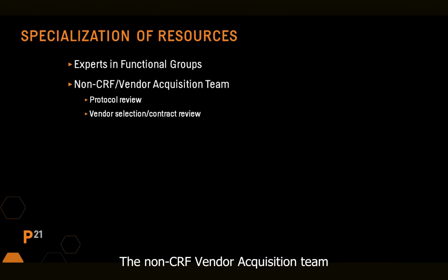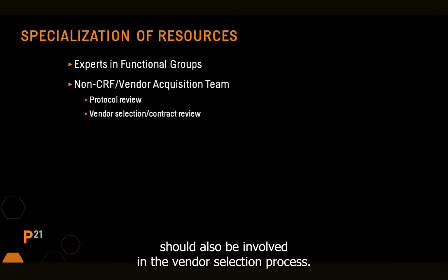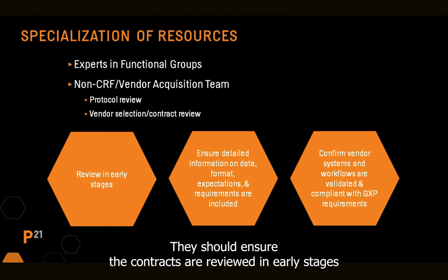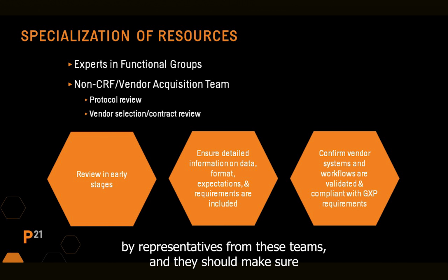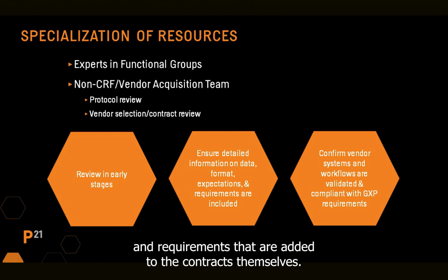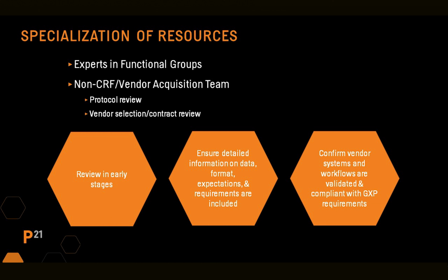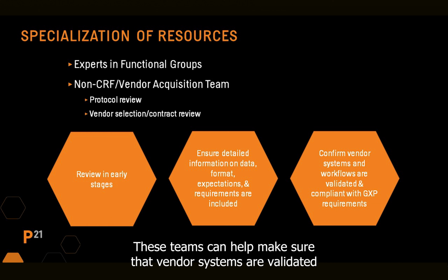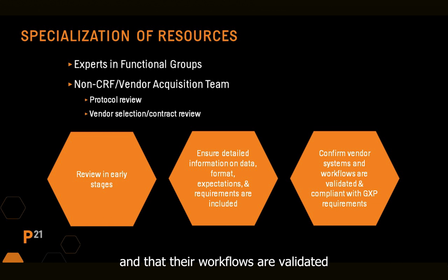The non-CRF vendor acquisition team should also be involved in the vendor selection process. They should ensure that contracts are reviewed in early stages by representatives from these teams, and they should make sure that more detailed information about data format expectations and requirements is added to the contracts themselves. These teams can help make sure that vendor systems are validated and that their workflows are validated and comply with all GxP requirements.